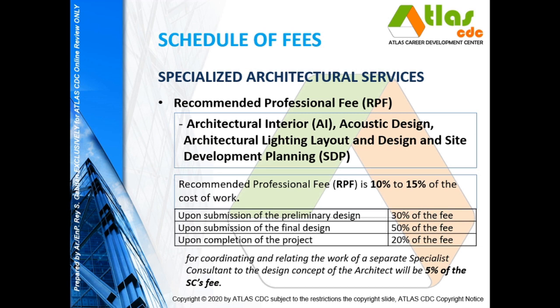So that is 10% to 15%. Now, the manner of payment is upon submission of the preliminary design is 30% of the professional fee of the consulting architect. Upon submission of the final design is 50% of the fee, and upon completion of the project is the remaining 20% of the professional fee.